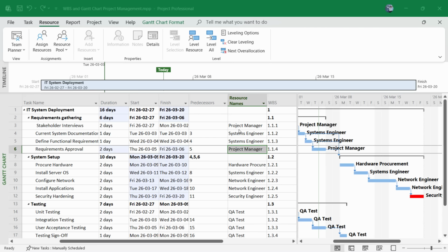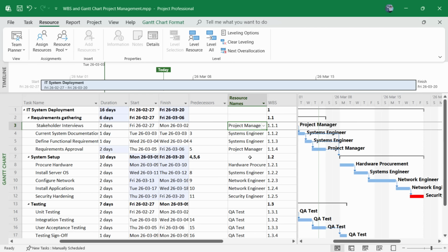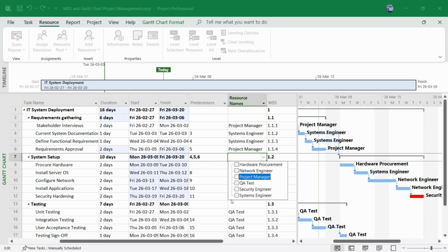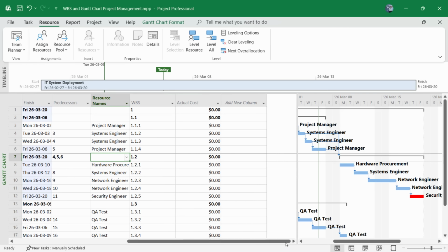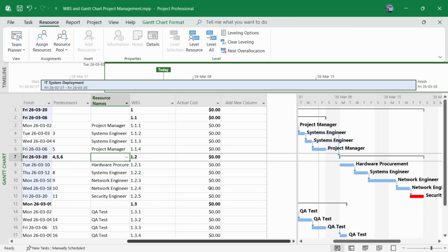Okay, so I have added the various resources that we need, and if we went to any of these sections, you'd now be able to see that we have more than one or two resources like we had previously. So the second part is for us now to look into the cost. And like I said previously, we can now see the cost that we have. This cost that you see as actual cost simply shows the amount of money you would have spent so far on that particular resource at that time of your project. And since our project hasn't kicked off yet, we can see that everything is in zeros here. But as you progress, these figures would actually change.